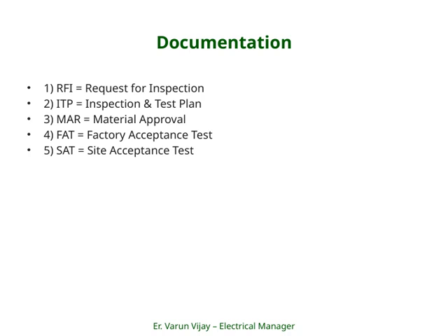Finally, we have SAT, or Site Acceptance Test. This is performed once the equipment arrives at the site. It confirms that everything functions properly in the actual operating environment, ensuring the system is ready for handover.